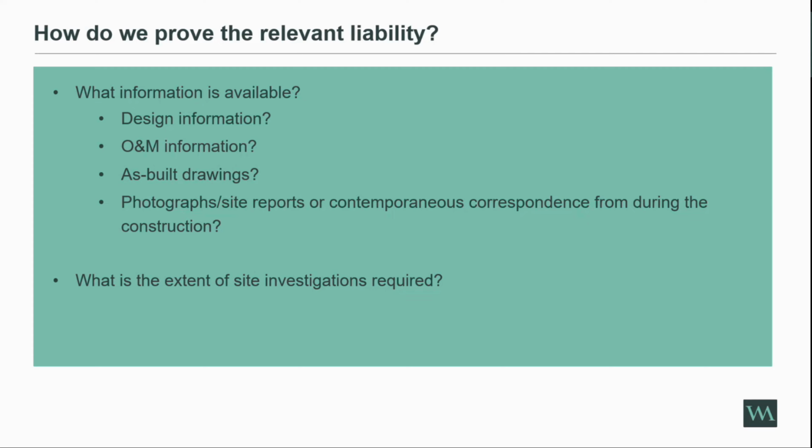Do we have any site reports? What contemporaneous correspondence do we have? Were there any progress reports that were done? Was there any sort of QA procedure that was done at the time? Is there anything that we can use to paint a picture of the actual design and construction of the buildings? And this then leads us on to the next question of, well, what site investigations do we need to do?